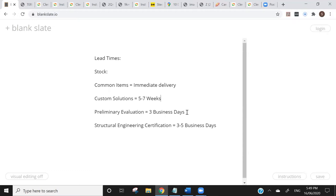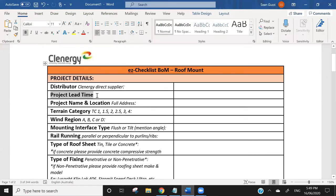You'll receive a preliminary evaluation from the structural engineering team, and at the same time receive a quotation through your wholesaler for the engineering works if the project comes off. If that happens and you place an order on the stock, you also place an order through your wholesaler on the actual structural engineering certificate. After that point, assuming we have all the information we need, it usually takes around three to five business days for our structural engineering team to come back with those certificates.